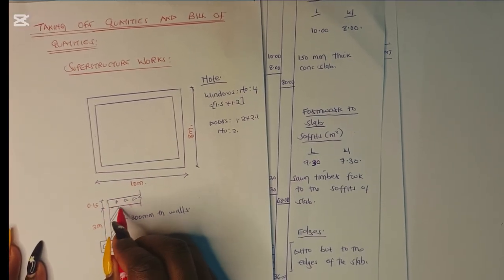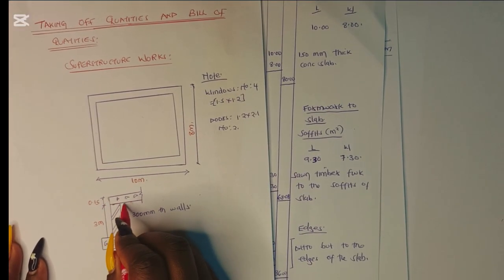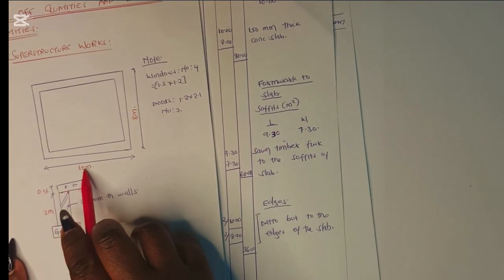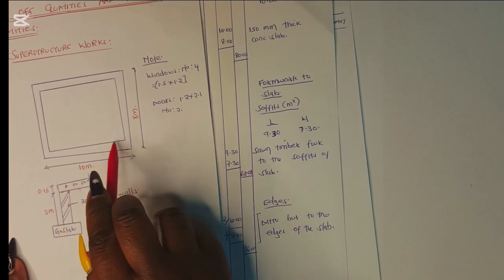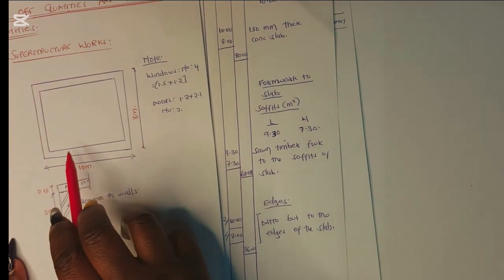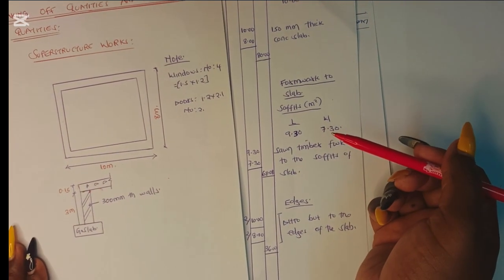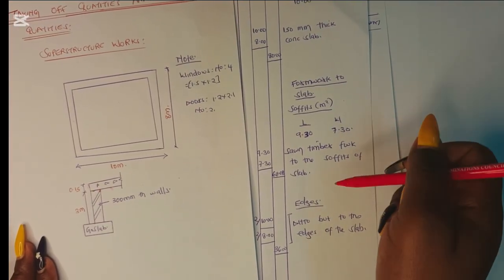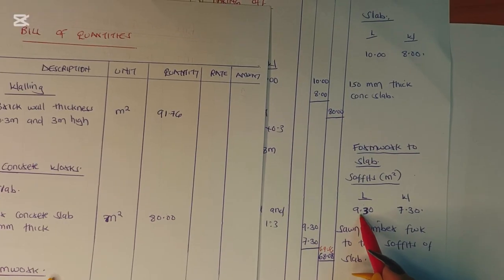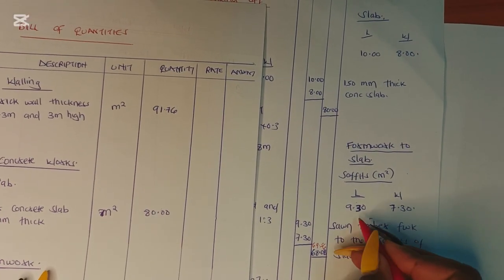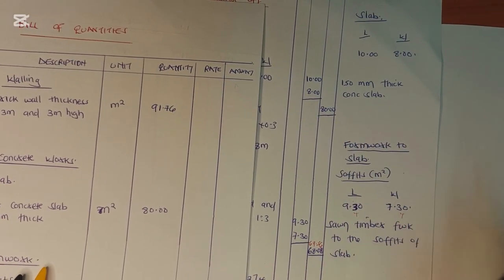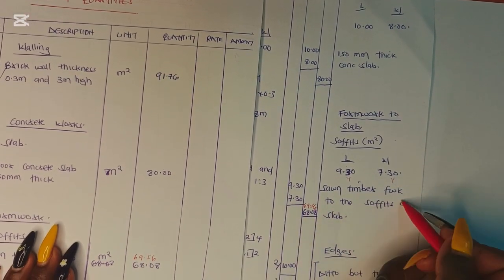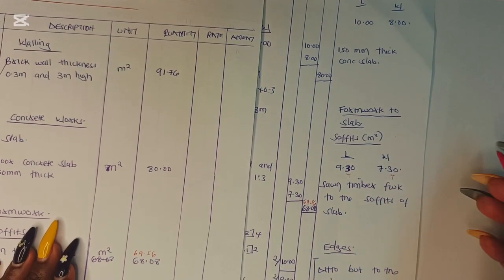For the soffit formwork we use the internal length and internal width because it starts from inside the walls. Our internal length is 10 meters minus 300 mm on each side, and the internal width is 8 meters minus 300 mm on each side. When we subtract those we get 9.4 and 7.4, so 9.4 by 7.4 gives us 69.56 square meters — one timber formwork to the soffit of the slab.